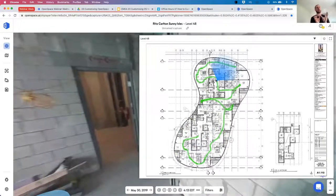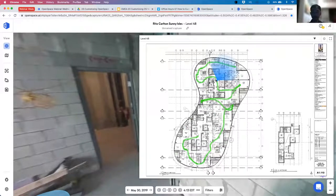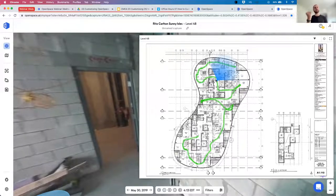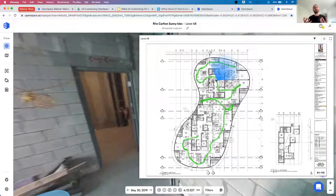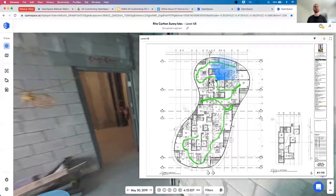One of the things Kyle touched on was making sure you're walking everywhere you want to walk. You'll notice some of his walking tracks were very close together — going backwards and forwards as he moves through the project — and that's why, because you end up getting much better coverage. If you ever need to go back, you're certain to have photos of what you want to look at.